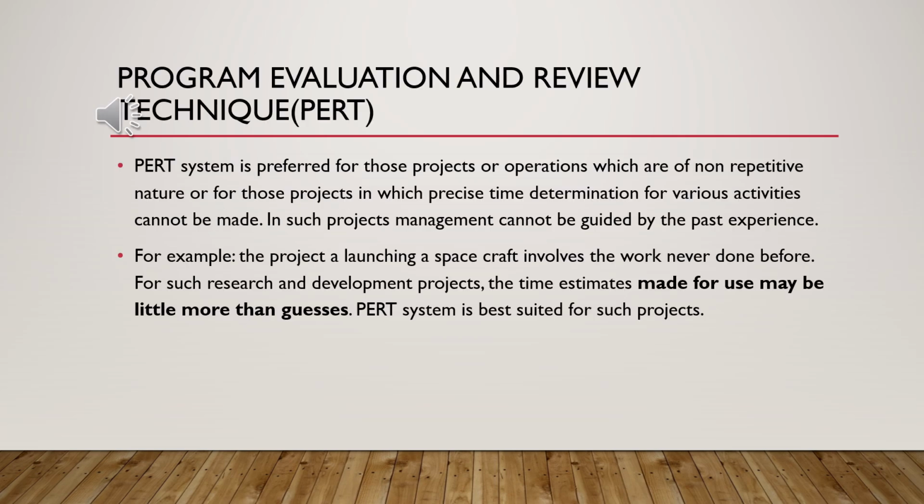The PERT system is preferred for those projects or operations which are of a non-repetitive nature, or for those projects in which precise time determination for various activities cannot be made. In such projects, management cannot be guided by past experience. For example, a project launching a spacecraft involves work never done before. For such research and development projects, the time estimates may be little more than guesses. The PERT system is best suited for such projects.